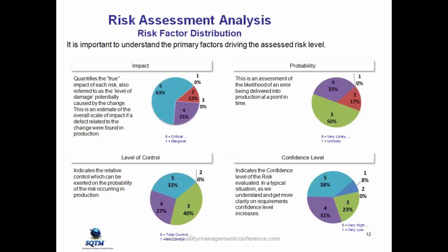Well, if you did the risk assessment at the end of design, it might go down to 15. So now you see the risk is lowering as you are getting into your testing phases. That's the reason why we want to do this more than once. Or that risk could be going up, which should be an indication at the project level that something's going on with this particular requirement.